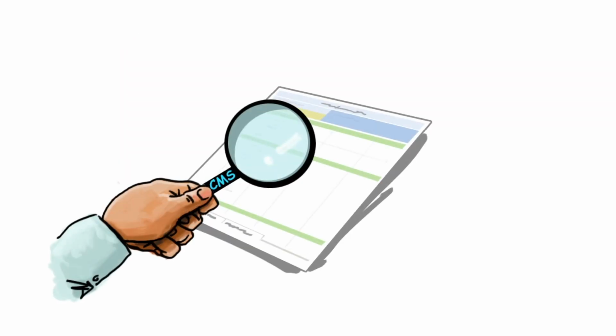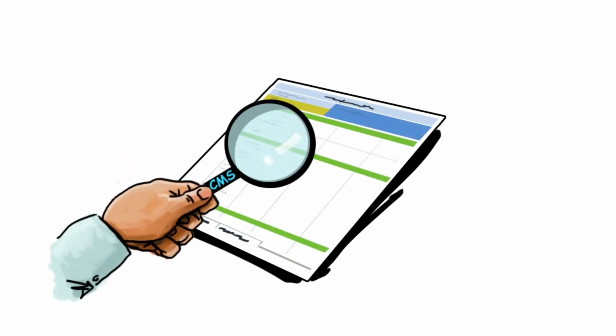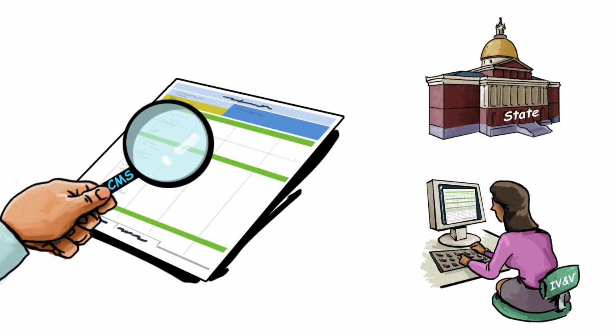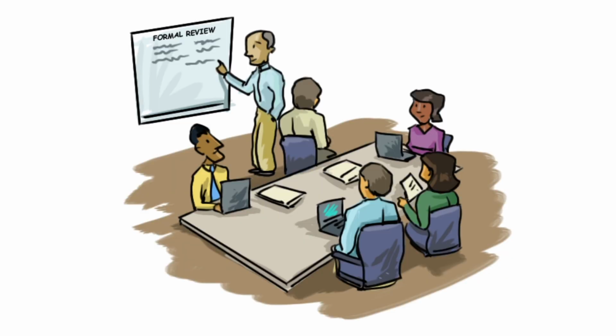PHI or PII. For the project initiation and operational milestone reviews, the milestone reviews consist of CMS reviewing the checklists and IV&V progress report and providing a response. The milestone review is concluded when CMS sends copies of the completed progress report to the state and to the IV&V contractor. Usually, no site visit is required. However, there may be cases where CMS considers a more formal review to be appropriate and may schedule a teleconference or site visit for the milestone review.